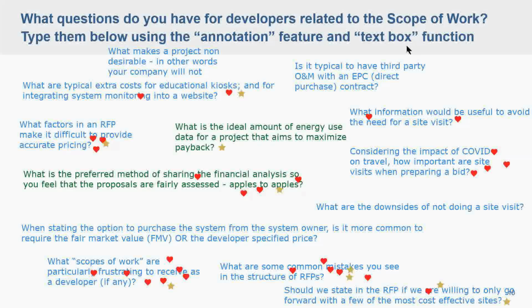Sure. There were a couple of questions about site visits, and site visits are definitely important. Providing a site visit time that's maybe a week or two after the RFP itself is released is important. Allowing developers to ask questions, and giving yourselves time to respond to those, is also important. Realistically, from the day the RFP is released, maybe 6 weeks is a reasonable due date, assuming you have the site visit and then another week or two to ask questions and provide the answers for developers to update the proposal with.